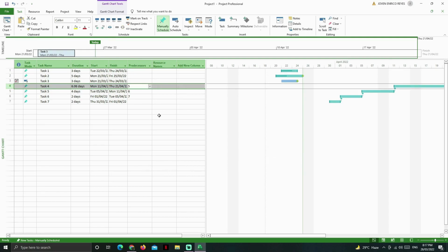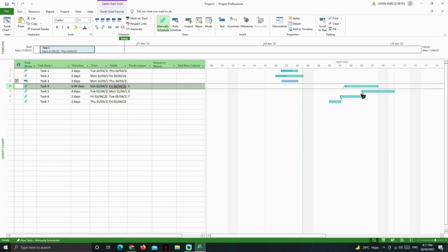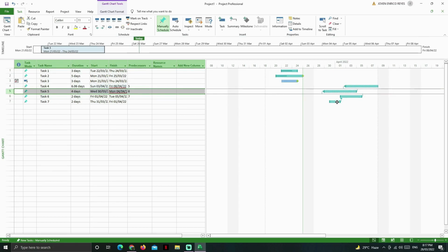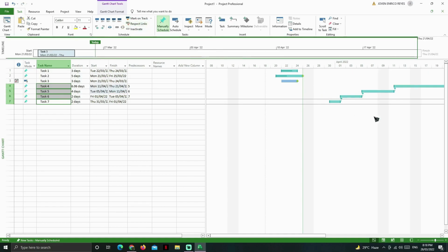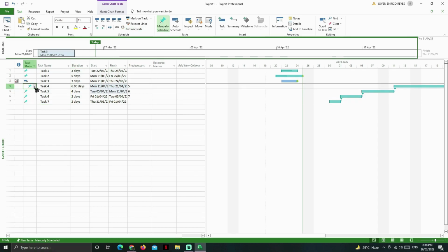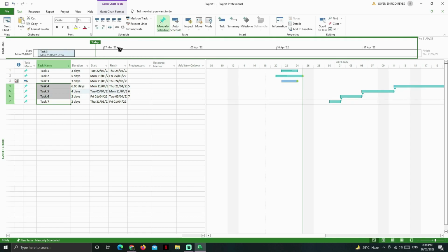Pay attention when moving manually scheduled tasks that have links. In case the new schedule does not respect the kind of link, you will get errors on the task, shown in a contoured bar. You can use Respect Links under the Task tab to correct the schedule of the current task. In the case of auto-scheduled tasks, these are solved automatically by Project depending on your choice from the planning wizard.